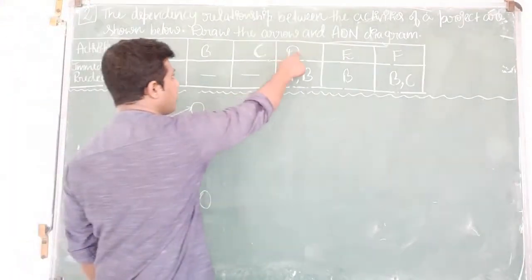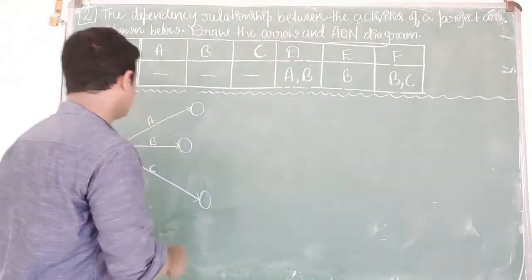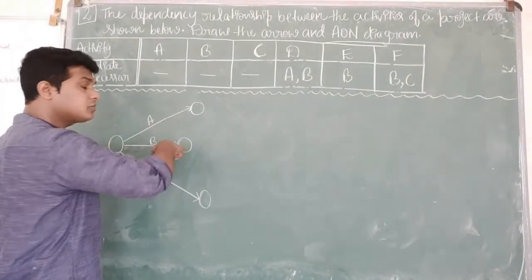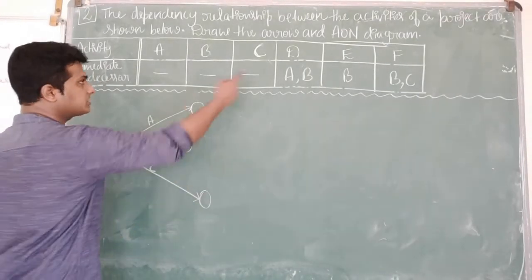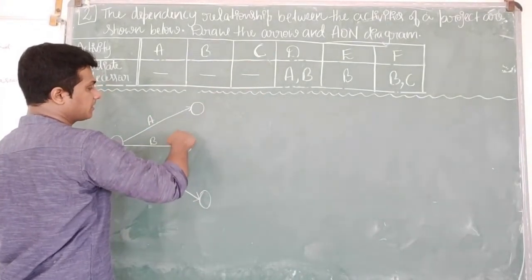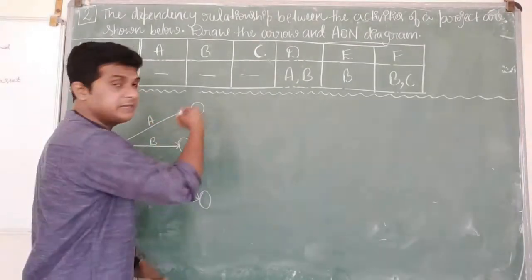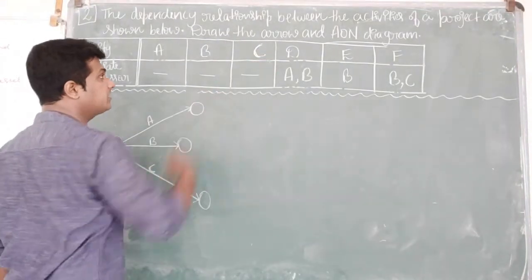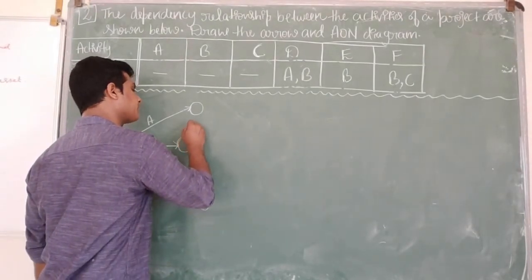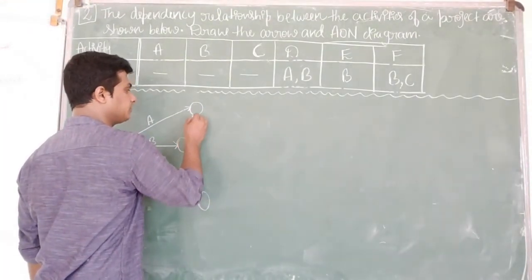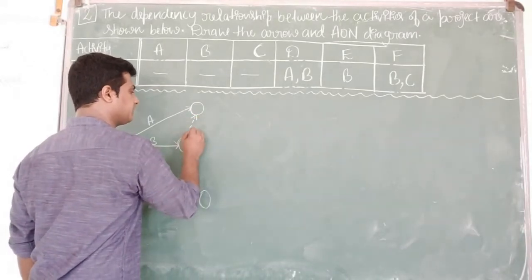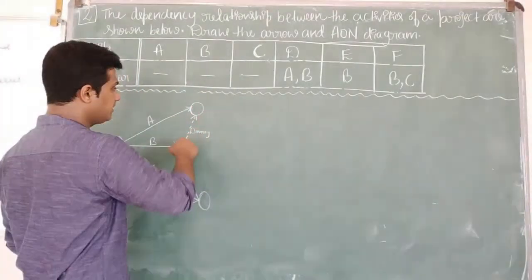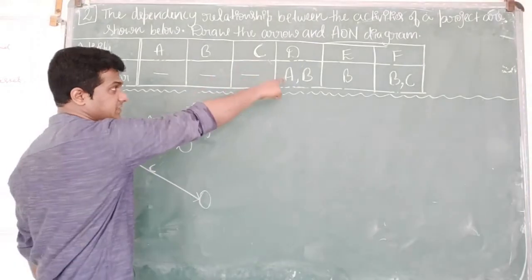To draw activity D, activities A and B should be completed. But currently A and B are at different events with no connection between them. Since we cannot start activity D before completing both A and B, there should be a link between these two activities. For that reason, we will draw a dummy activity from B to A's node using a dotted line. This is called a project dummy or logical dummy, because it establishes a necessary connection to draw the diagram.